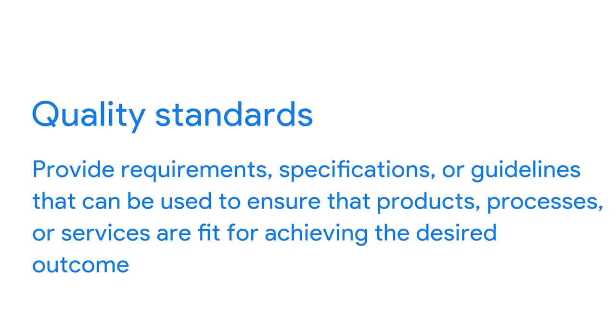Quality standards provide requirements, specifications, or guidelines that can be used to ensure that products, processes, or services are fit for achieving the desired outcome. Set quality standards with your team and your customer at the beginning of your project. Take the time to define the quality standards and criteria for your current work so that your team members and stakeholders understand exactly what they are. After you set those well-defined quality standards, you'll want to check in periodically and make sure everything looks okay and the requirements are met. Remember that well-defined standards and requirements lead to less rework and schedule delays.